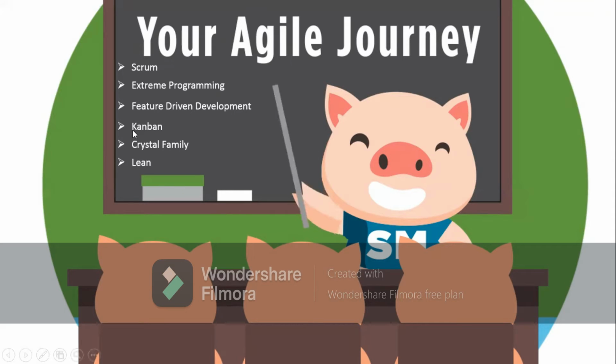Kanban uses the technique of Kanban boards, and that's the to-do list. If we're using the non-automated technique, you have a whiteboard or a blackboard and you place yellow stickers on it with the activities, the tasks to be done, the tasks that are in progress, and the tasks that need to be tested.